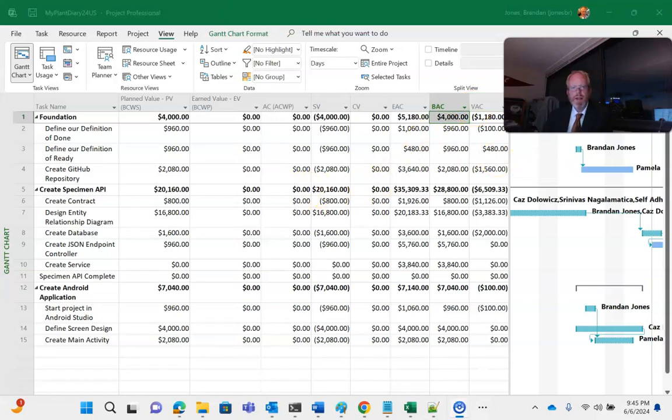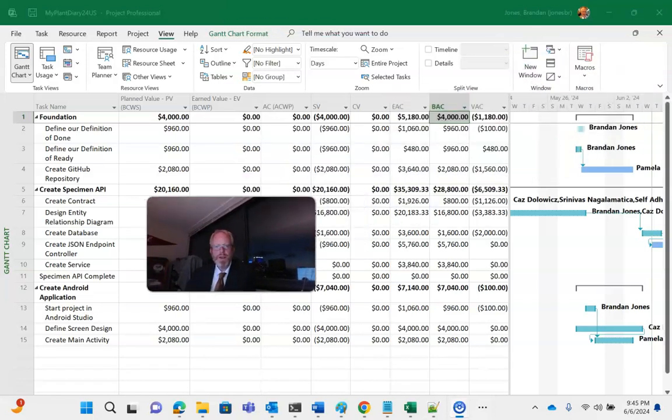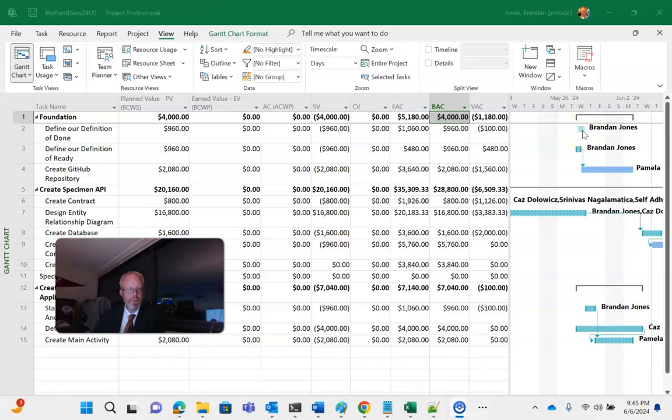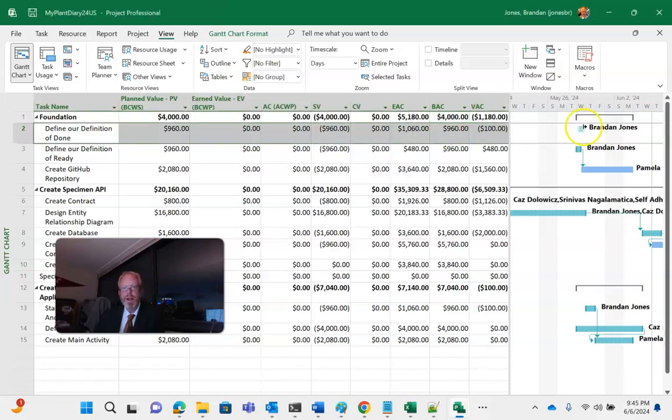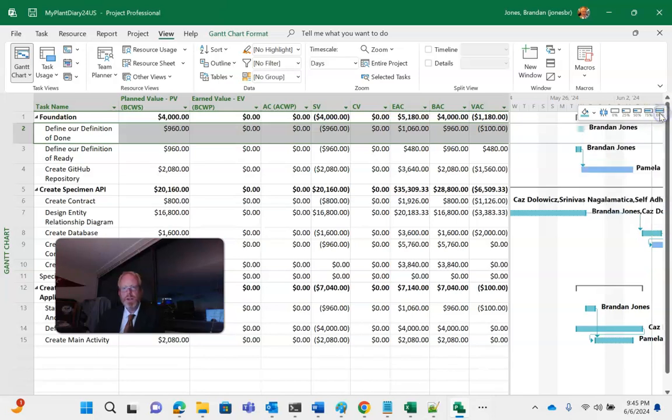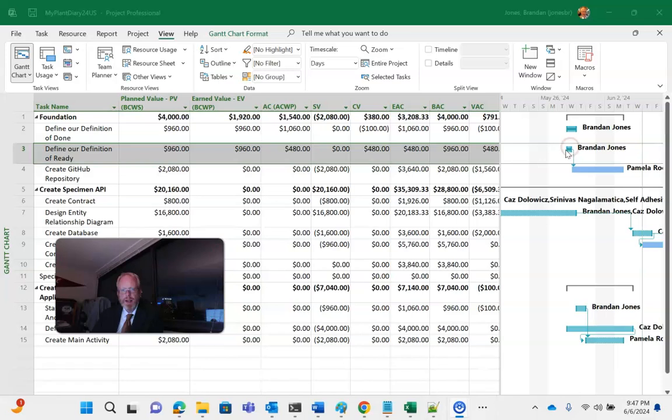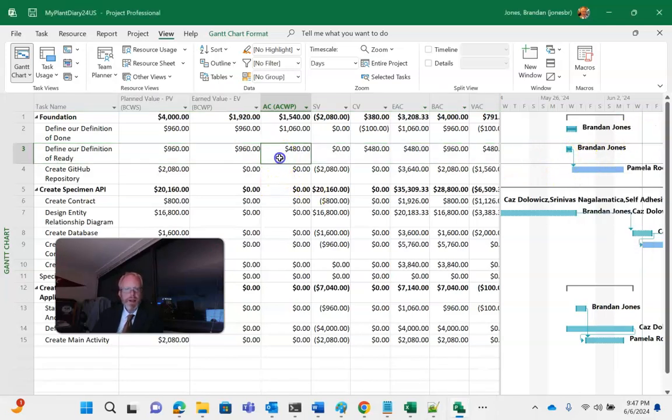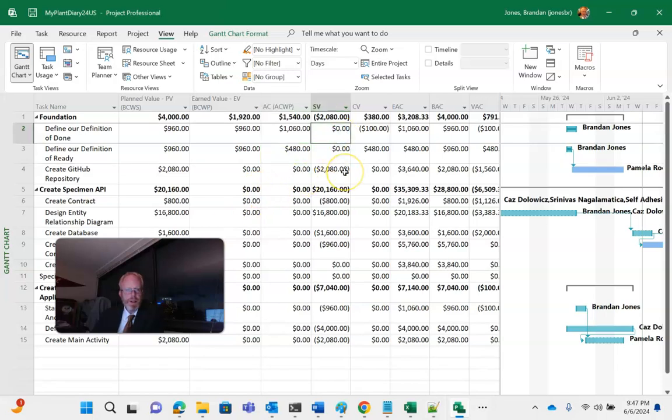Now, everything is showing a significant schedule variance because I don't have anything that shows progress in this column yet, but that's easy to do. I can simply go to my window here and say, let's call this define our definition of done, let's call it 100% complete. And do the same here for our definition of ready. Notice when I do that, the schedule variance drops to zero because it says we're complete. So we're looking pretty good.